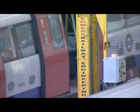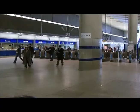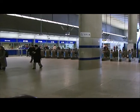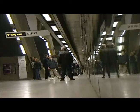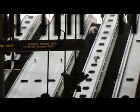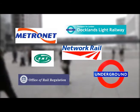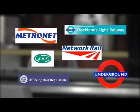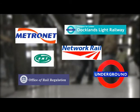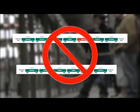The migration process and its timing has been carefully planned and scheduled so that the transition from current to new arrangements is achieved with maximum efficiency, yet with minimum disruption to London Underground and their customers. These changes have many interfaces and therefore much liaison is needed with a diverse range of other organisations. For safety reasons, it is not possible to run 6 and 7 car trains at the same time.